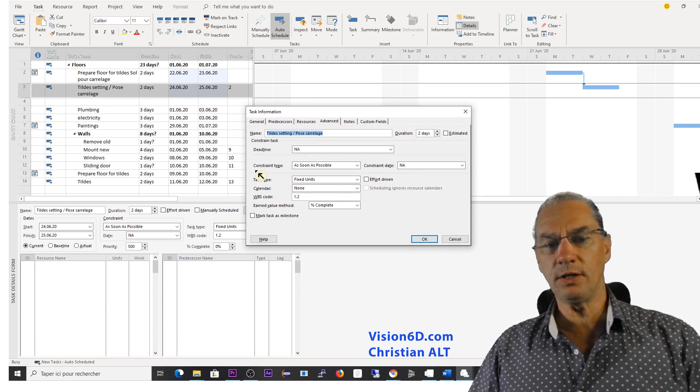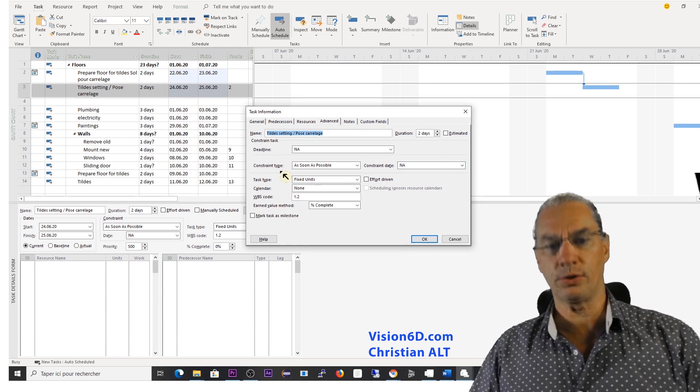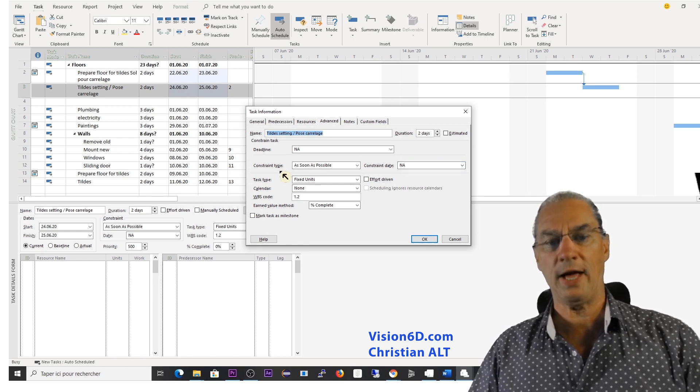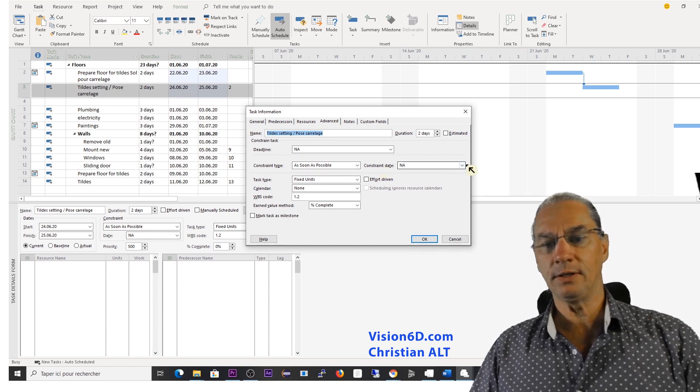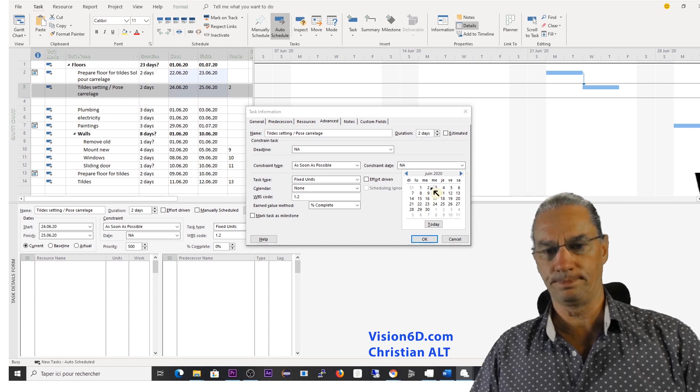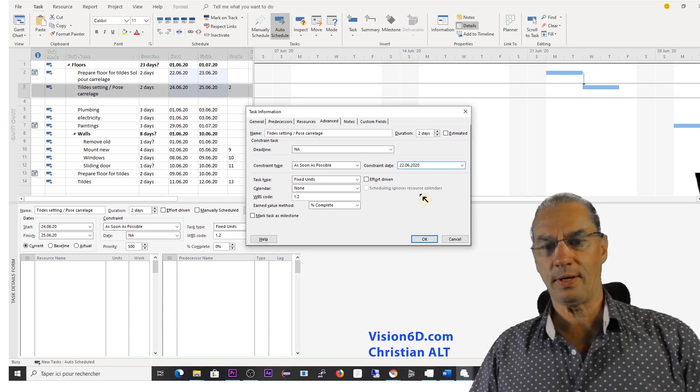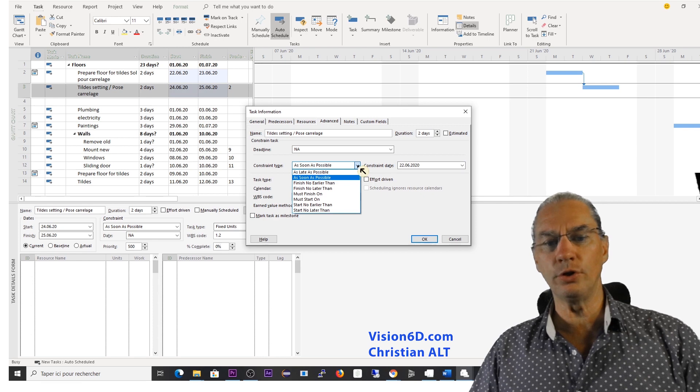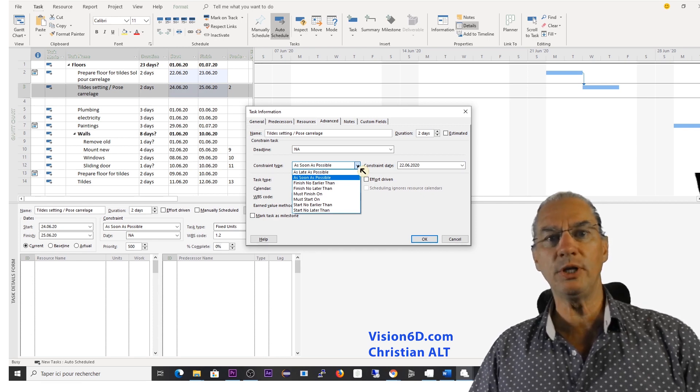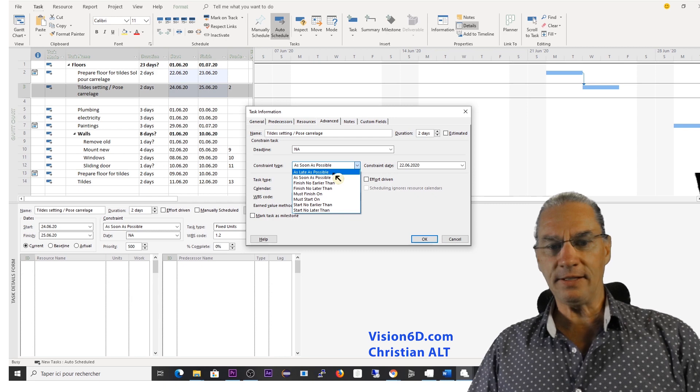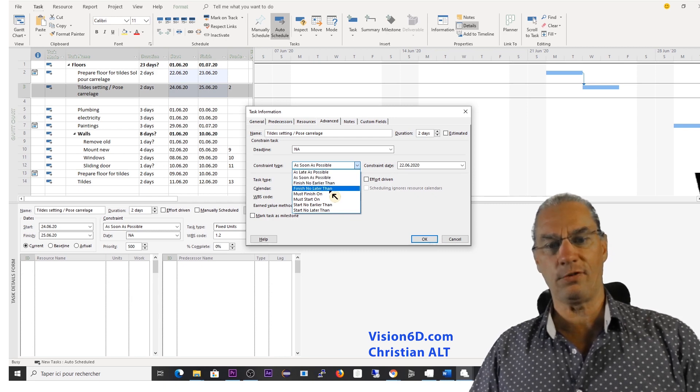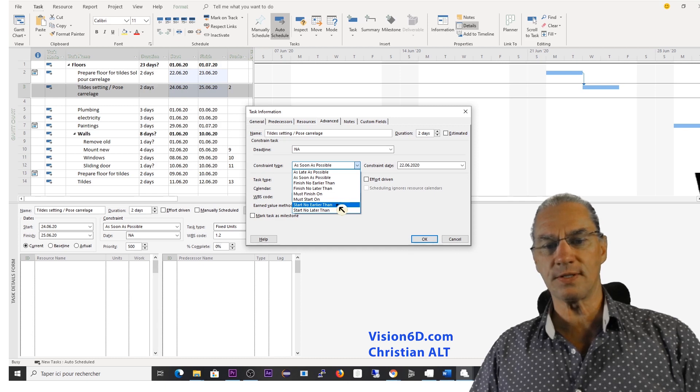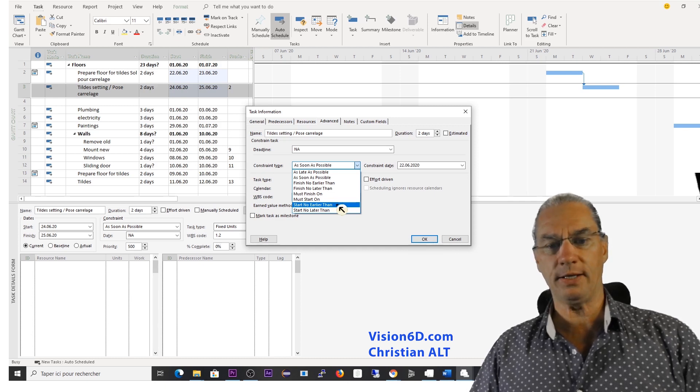you see here that we have the possibility to add a constraint. The constraint is composed of two elements, a type and a date. The date we know it's the 22nd of June. Setting it. And now we are going to look if there is a constraint type that could be useful to us.